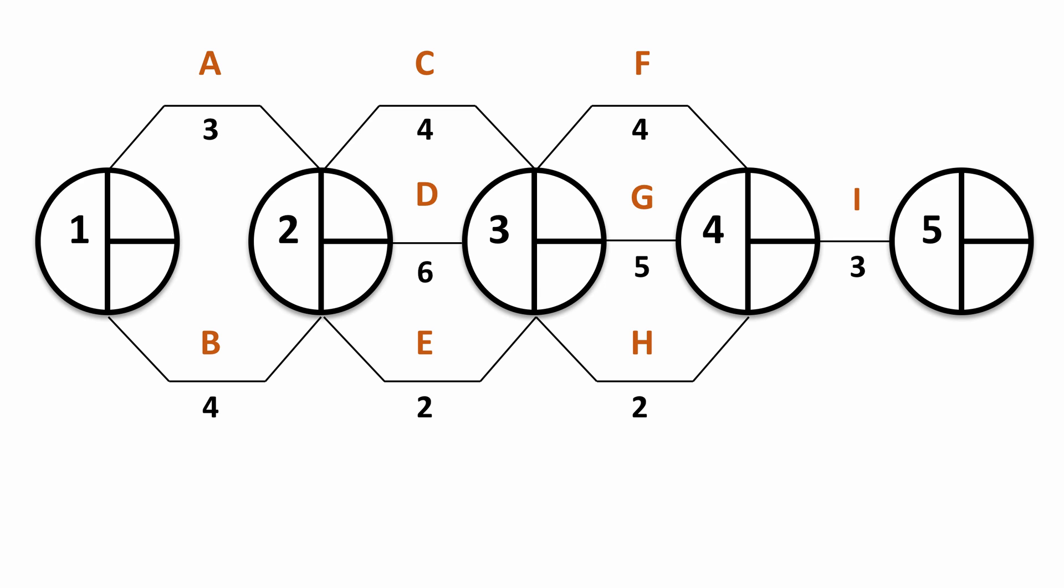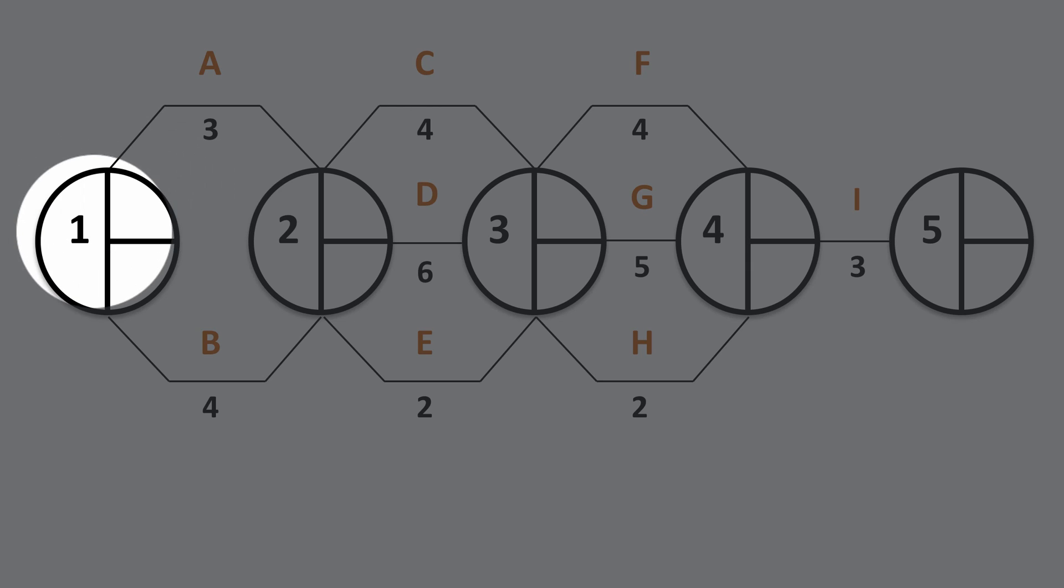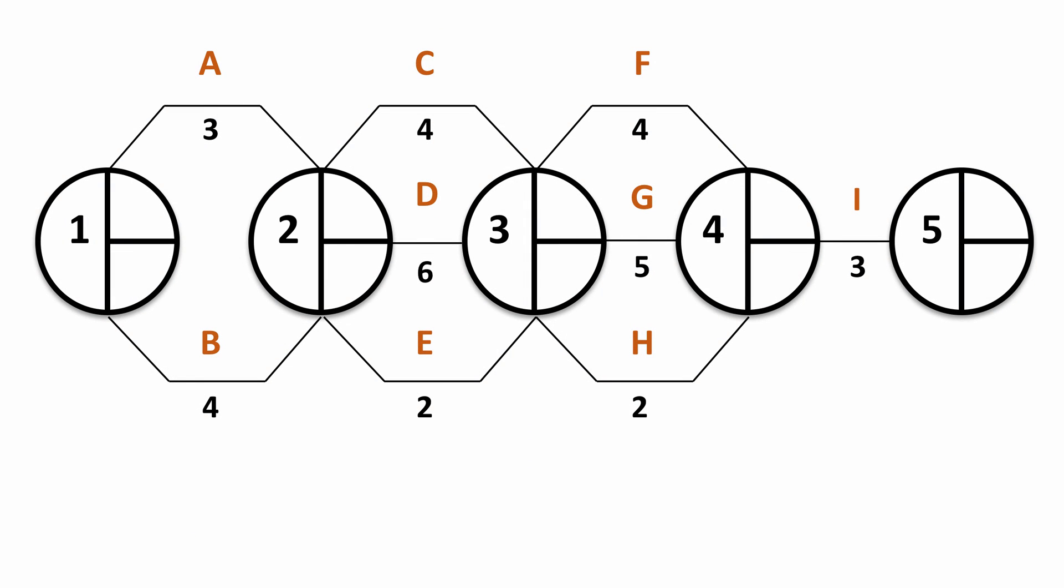We'll use the highlighter circle here just to help us guide our way through this network. At node 1 we have two activities that begin, activity A and activity B, and they converge on node 2. So at node 2 we have to wait for activity A and B to be finished before we can start the next series of activities and we have to wait for the longest activity to finish first. So B is the longest activity, therefore the earliest start time we can start C, D, or E must be 4. We have to wait for B to finish. A would have finished a week earlier.